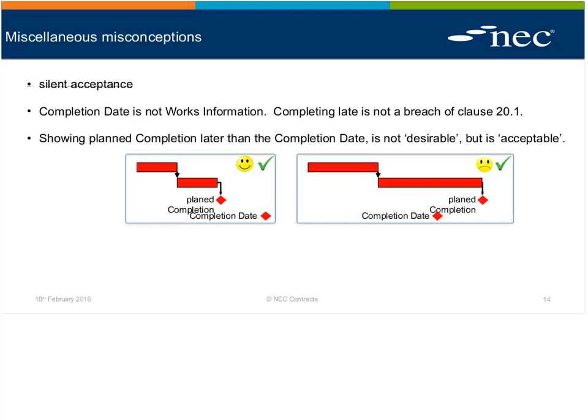Okay. Certainly, clause 50.3 is inoperative because you've got a first program. Well, as long as it shows the information the contract requires. Well, no, it says if no program is identified in the contract data. So, I'm not suggesting you do this, but if it's wrong, then there is a program identified in the contract data. Therefore, 50.3 is not operative. And this is diligence around awarding a contract.